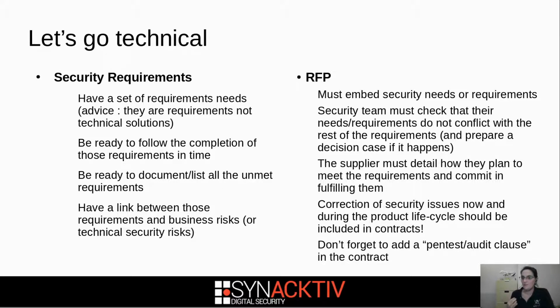Same, don't forget to add a pen test and audit clause into the contract that allows you as a client to actually pen test what you have been delivered, or to pen test the infrastructure if it's a service of your supplier. Too often, when I was in, and I am actually in, an offensive team, we were blocked because there was actually no authorization to pen test the supplier, and so again, you've lost.